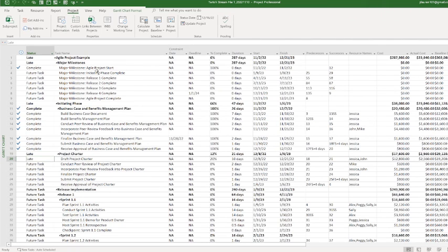And this is where a lot of things come into play afterwards, where you have to say to your client, look, you were late. So we need to renegotiate this finish date in some way, shape, or form. Or maybe there needs to be a discussion, a reevaluation of the scope. Those are potential conversations. It's not that you're saying no. It means you're trying to also look at what's best for the project and for your client. And a lot of times that doesn't really happen. So that's kind of my first spiel.